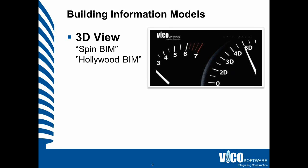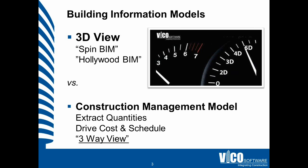So 3D view — the model created for visualization purposes is what we also call Hollywood BIM or spin BIM: a nice picture that you can spin around on the screen and present the design with. Now there is a difference between that and a model you create for construction management purposes. That model you create to extract quantities per location and use that to drive the cost plan and schedule plan, and then later the production control. That is not a 3D view, but we like to call that a three-way view.